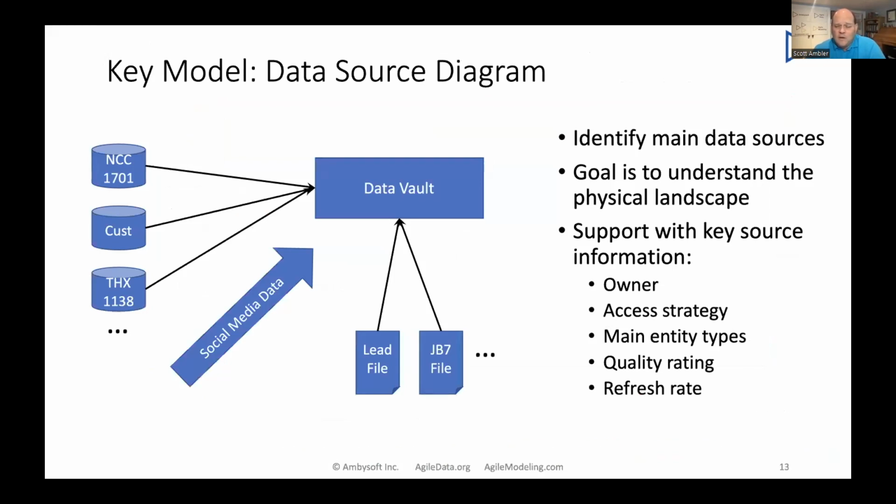Another thing, when I'm working on it with a team, I do want to do some upfront modeling. I want to get a handle on what my likely data sources are. And this could be a dozen data sources. It could be hundreds of data sources. I've worked in some really nasty scenarios where we had an incredible number of data sources that we potentially needed to work with, and over time pretty much did. So I need to have a list. What's my bill of materials, I guess you would call it, for potential data sources.